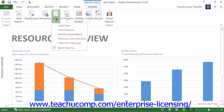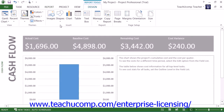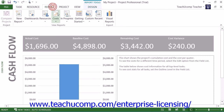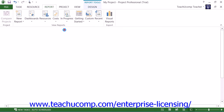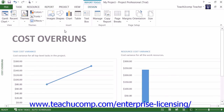Under the Cost Reports category, you will find the Cash Flow report, which shows costs and cumulative costs per quarter for all top-level tasks. It can be modified to show various costs and alternate time periods. There is also the Cost Overruns report, which shows cost variance for all top-level tasks and work resources. It is used to show where actual costs are exceeding baseline costs.